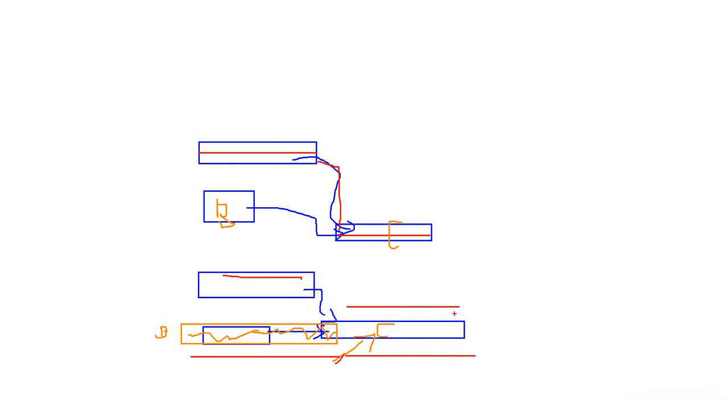So this is what happens when you have uncertainty, right? If you have high volatility in tasks in a situation like the one that I explained, you can have multiple critical paths. So the critical index is a property of each one of the tasks that tells you the percentage of the iterations in which that particular task was part of the critical path.